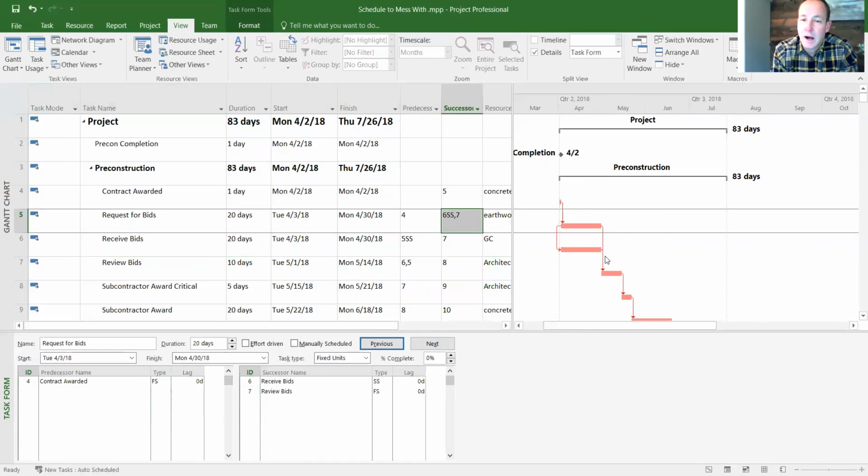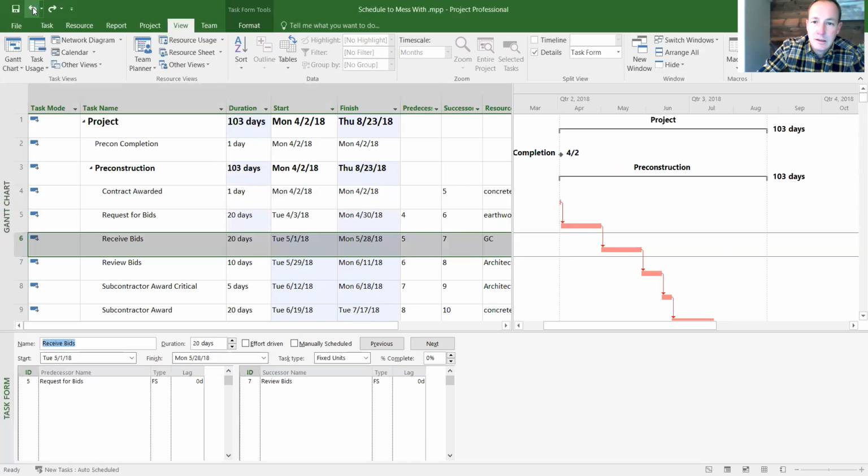There is another way, by using a finish to start relationship with a negative lag. Okay, so the lag is how much you overlap activities, you lag them either positively or negatively. Scheduling gurus will tell you you're not allowed to do negative lags. I'm not going to tell you that because I use them all the time in industry, and it made my life really nice and really good because a lot of times it makes sense.